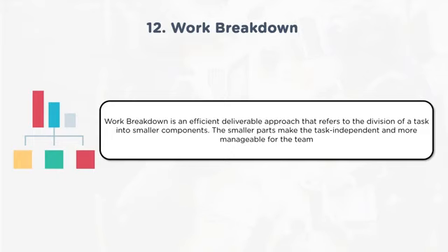Further, after creating a work breakdown structure, one will go and sequence the activities. Sequencing will happen based on in what priority, in what order, deliverables should happen. Then once the sequencing is done, it will be checked to see whether anything can be optimized, anything can be done in such a way that a smooth flow of the project can happen. There are no dependencies which will make the project delay. As the flow happens smoothly, you would find various techniques like critical path method, network diagramming, critical chain method. All these are used.